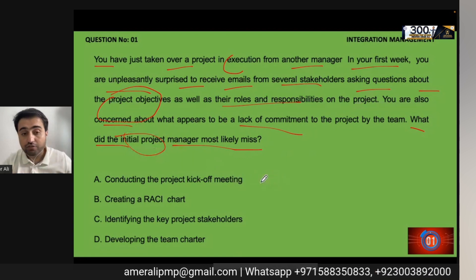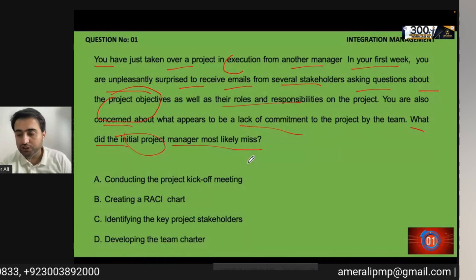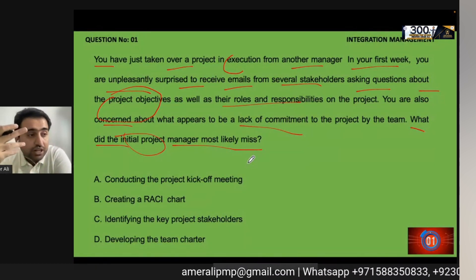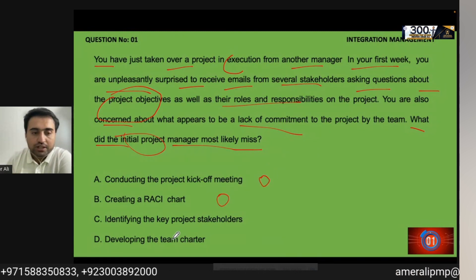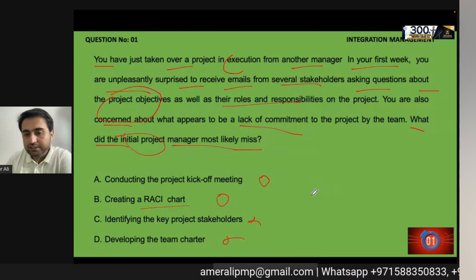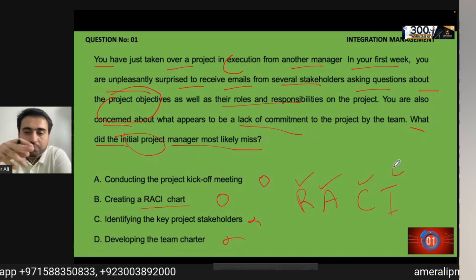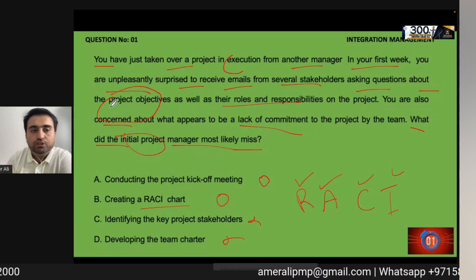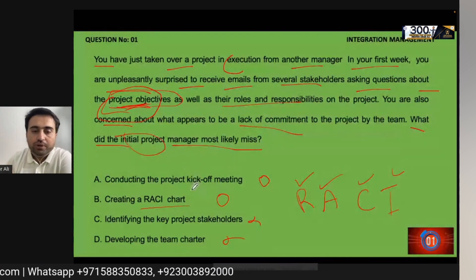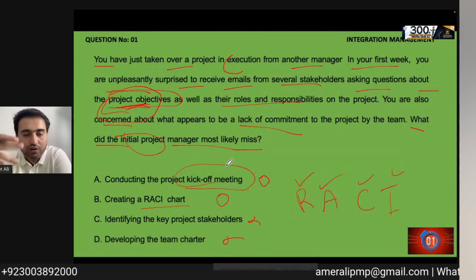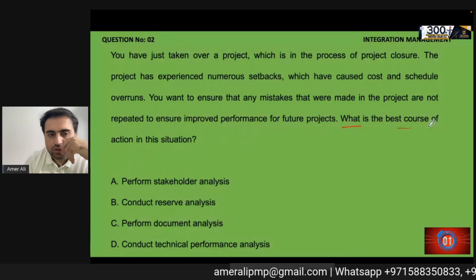The answer is conducting the kickoff meeting. The kickoff meeting is the time when the project plan is ready, the team comes together, and you share with everyone their responsibilities. A RACI matrix could also be an answer — RACI stands for Responsible, Accountable, Consult, and Inform. But the key keyword here is that stakeholders are not clear about the project objective. The kickoff meeting clarifies both the project objectives and key responsibilities for every individual.